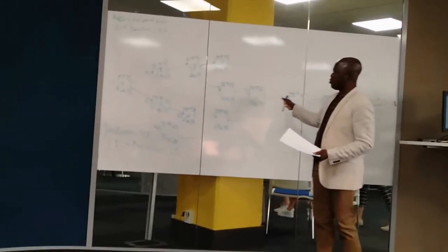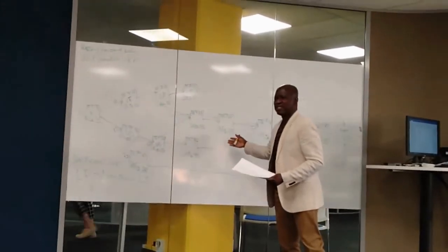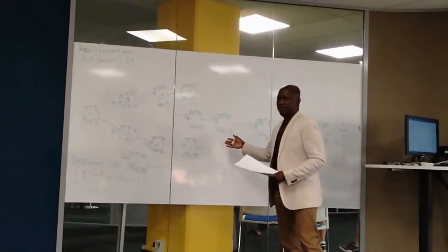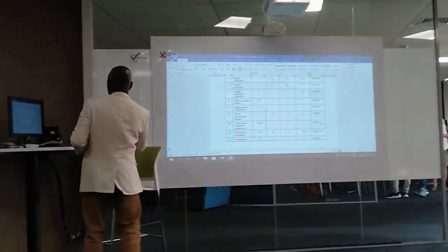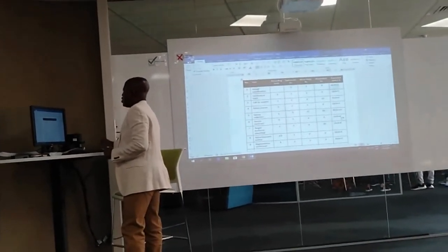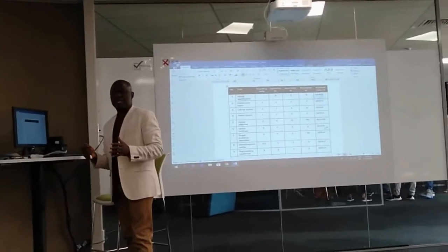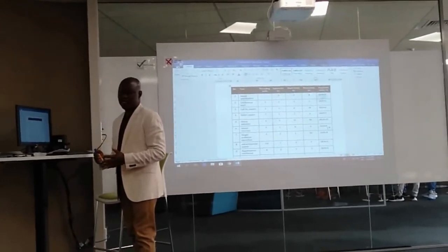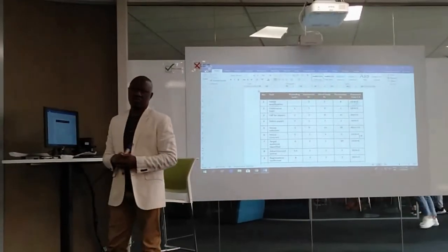I guess everybody should be able to understand what we're working out. This is much more than critical path. This is like CPM, actually PERT, because we have probability time. We take into consideration the optimistic, pessimistic and most likely time. We add them together and divide by 6, because there's a formula for it. And that's how we arrive at this.